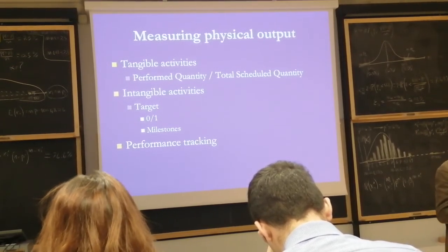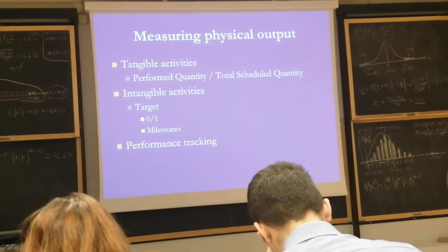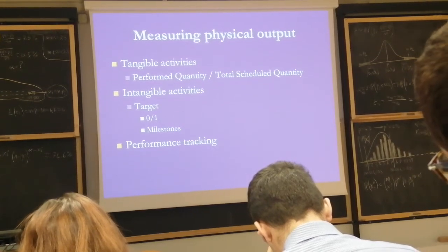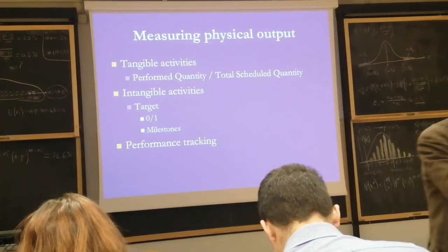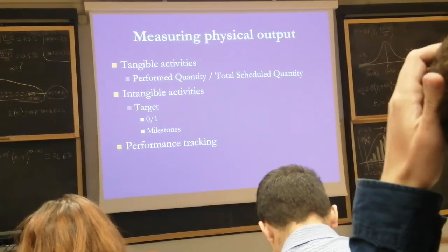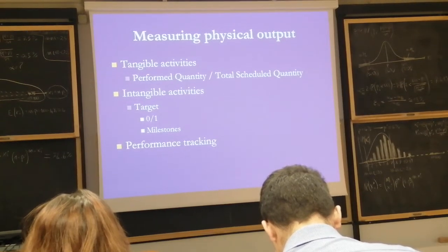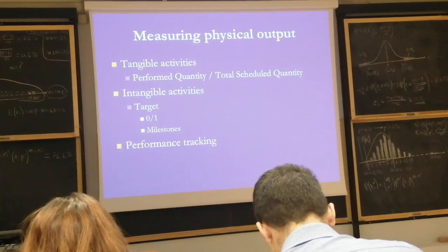First of all, we need to define when it comes to 1. So there's a definition of done that we need to agree upon. For instance, for you, the 100% could be that you have finished, but for me, it's when it's accepted.